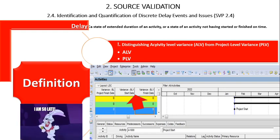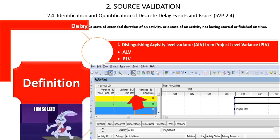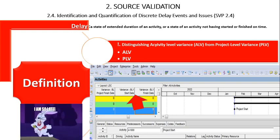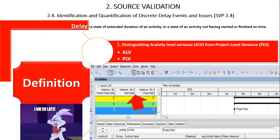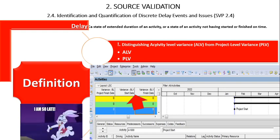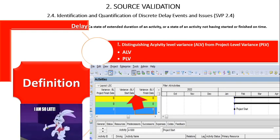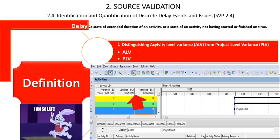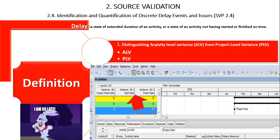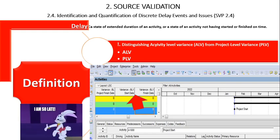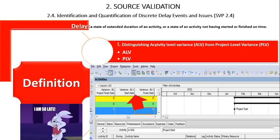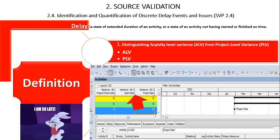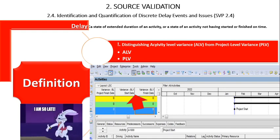These delay causes include waiting, delayed start, performance, productivity impacts, additional work, interruption, work stoppage, weather, strikes, etc. Given these variations, there are two main ways in which activity-level variances are expressed in a CPM schedule.